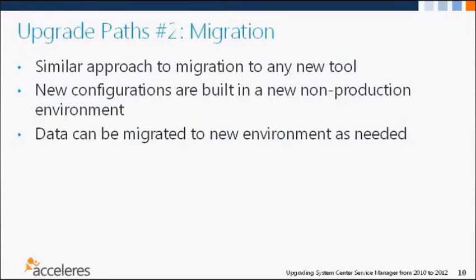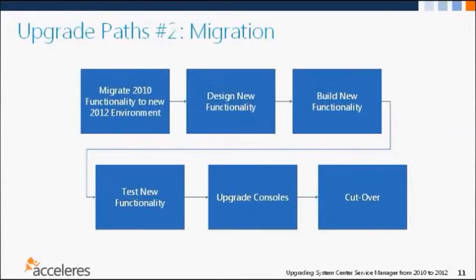One of the disadvantages we'll see later is the loss of historical data. It is possible, though, to migrate data from your existing 2010 environment to a brand new 2012 environment. It's also possible to just not migrate it and have your historical environment in a separate system, like you might have done when you migrated to 2010 in the first place. But data can be migrated using CSV imports and some other methods, so it's not something that you can't get around.